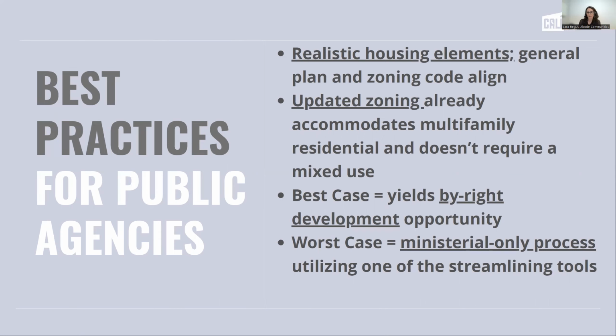So ultimately, we hope that we would land somewhere with a site that has either everything so well in place that it's effectively a by-right opportunity, or in a kind of quote unquote worst case, we can use one of our streamlining tools and get through the process pretty quickly. So if we can get a project entitled in 6-7 months, that's fantastic. Faster is even better through that by-right process. And let's go, I think, to our last slide now.